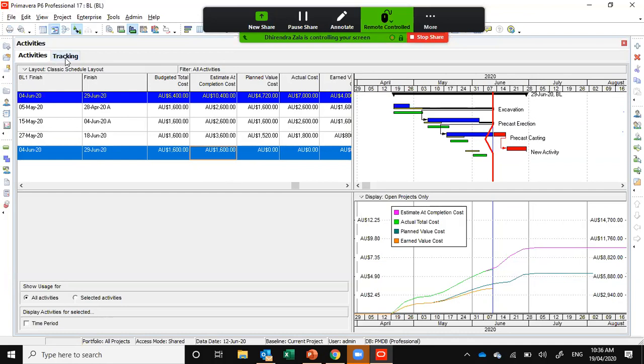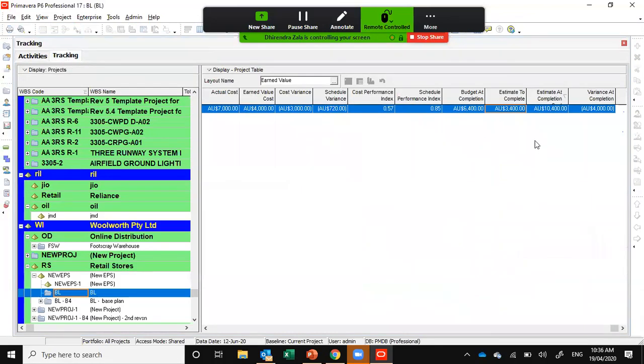So we are definitely getting it here. To achieve a project of $6,400, you have to spend $10,400 to complete it. Because of the loss in cost, or we can say we have overrun the cost and wasted time in the project because of resource performance and all other aspects, we are getting a variance in performance.